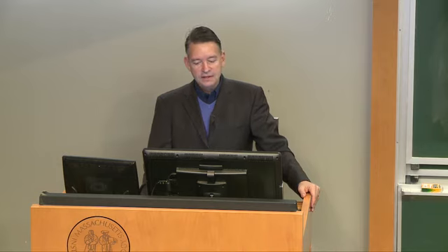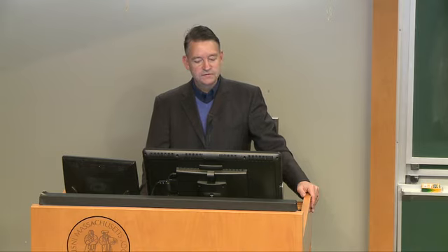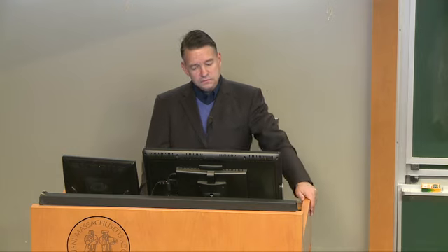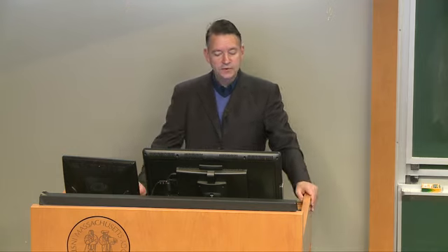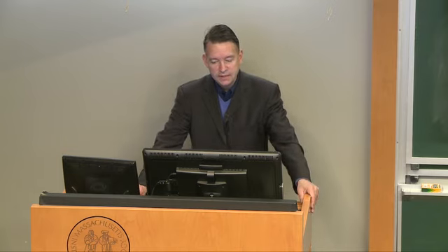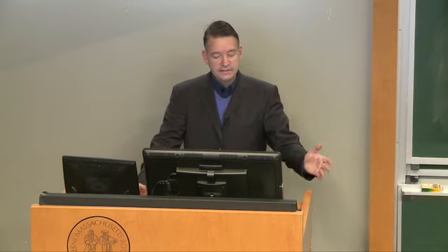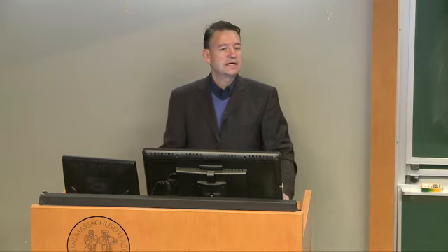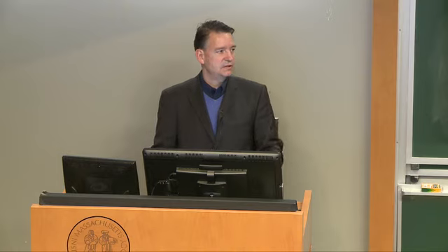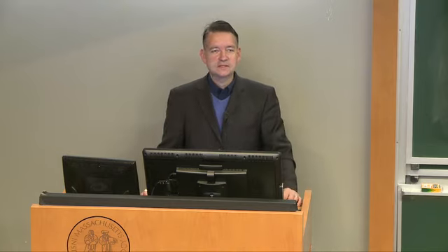Okay? And then validation is the question, was the right end product realized? Did you actually build the right thing? Did you deploy the right solution? Validation focuses more on during or after system integration. It's typically done in a real or simulated mission environment. You check if your stakeholder intent is met, and it's often done using the full-up system. It's difficult to do validation on a subsystem basis alone.